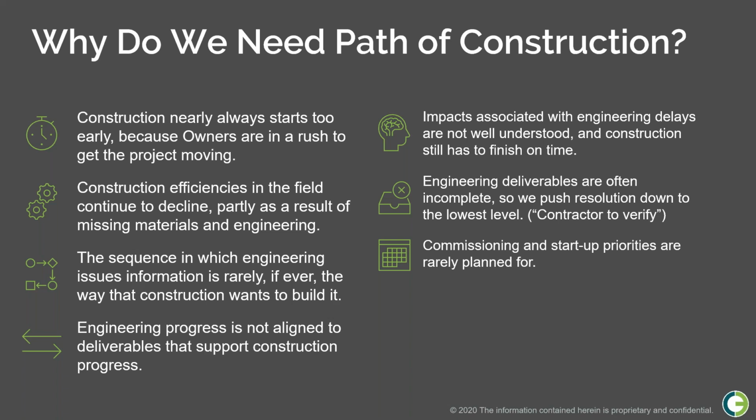Engineering deliverables are, and I think I'm being a little mean here by saying often incomplete, but certainly all too regularly it can happen that engineering deliverables can be incomplete. And we tend to push resolution of it down to the lowest level. I've seen too many times notes on drawings, contractor to verify, or the engineering company or the owner telling the construction contractor to raise an RFI back to them to ask a question. So all of this is because we're rushing to push information out and meet dates, and we're pushing out incomplete information.